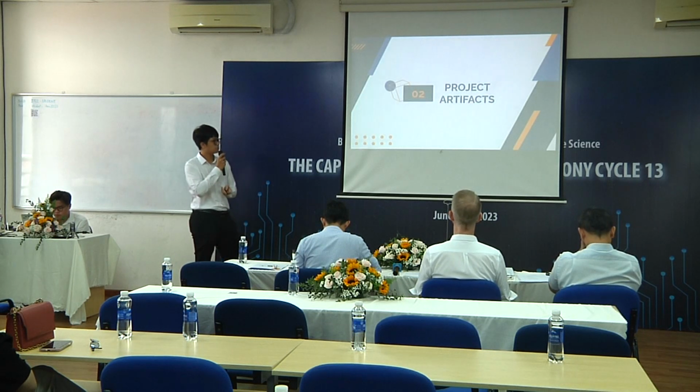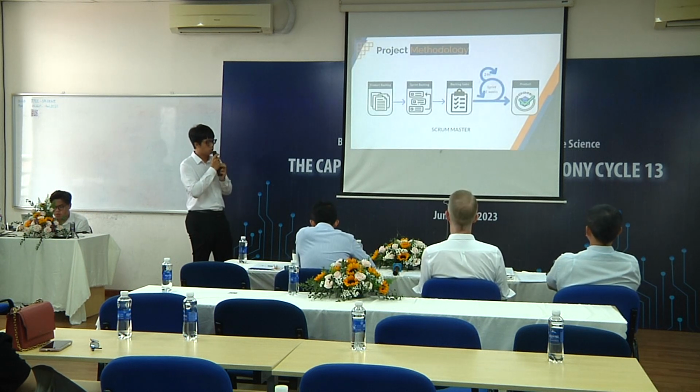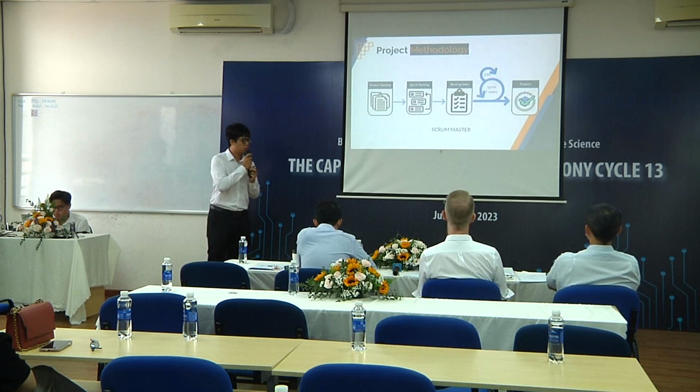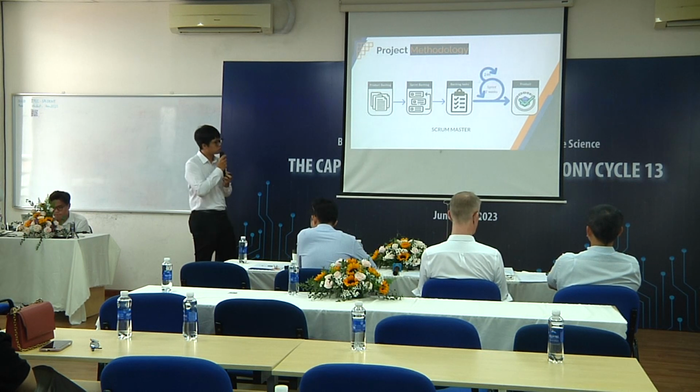About our project artifact, we use the Scrum framework. We will have 2 weeks per sprint, and every sprint the team leader will assign tasks to members. Members will break down tasks into subtasks and implement the features. Each subtask will be a pull request for our team leader to review our code and move to the next subtask. We also have a daily meeting on this Discord channel.